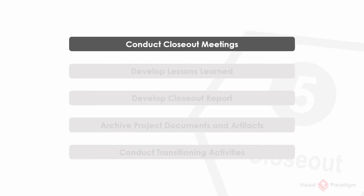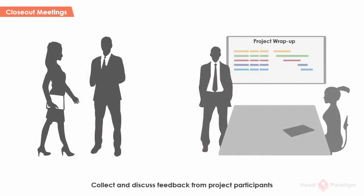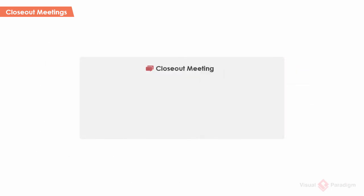Conduct closeout meetings. This phase begins by conducting meetings with different participants of the project, including but not limited to stakeholders who took part in different project activities such as requirements elicitation and acceptance testing, and the project team members. The purpose of these meetings includes identifying lessons learned, discussing things that went wrong and well during the project, and determining how the experiences earned can benefit similar projects in the future.